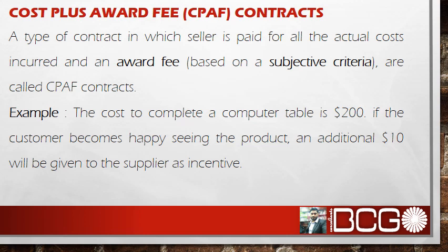This is a very good characteristic of CPIF contracts. Okay guys, so moving on to the last type of the cost reimbursable contracts, they are termed as CPAF contracts or cost plus award fee. The concept is similar to that of incentive fee or CPIF contracts. So the seller is paid for the actual cost incurred plus award fee. Now, in contrast to that of a